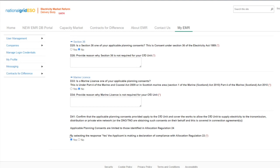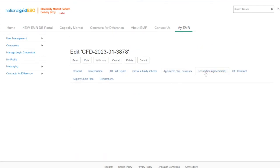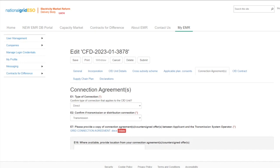The applicant can now move to the Connection Agreements tab. In this section, applicants will be able to provide the connection agreement, countersigned connection offers with the acceptance document, or private network use agreement documentation applicable to the CFD application. Applicants will be presented with Question E1 where applicants are able to confirm the type of connection that will apply to the CFD unit. The possible options are direct, partial, and islanded CFD unit.